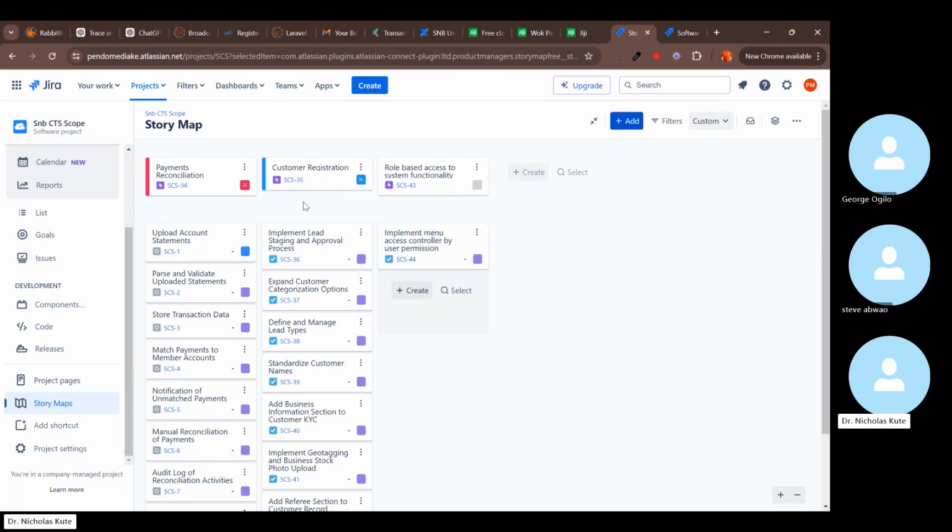Just go ahead and explain it, put in your acceptance criteria, the description, and we normally also have background information if needed, just to describe exactly what you want to achieve in that particular task. Make sure they are stories, because if they are not stories, you may not add tasks below them. So make sure they are stories.